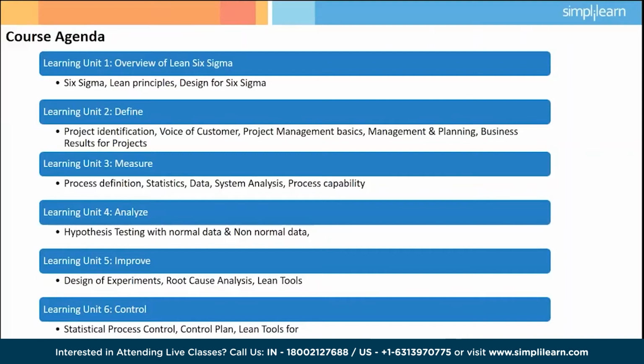And so in the define phase, you select your team members, you put a project charter together that says, here's the objective of what we're going to be working on. If we're successful, this is what we'll achieve. These are maybe some of the resources we anticipate needing for this project. Here's the timeline that we're thinking this will take, and so on. So those parameters create the foundation for your project, and it also ensures that everybody's aligned, on the same page, and knows what they're working on.